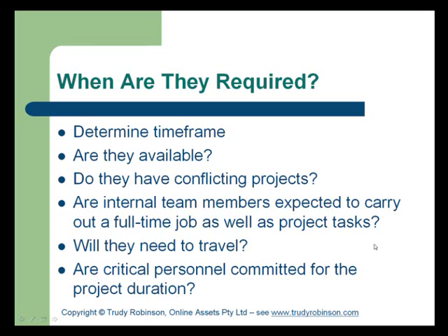Equally as important as identifying the tasks and the resources available is to ensure that the project time frame or timeline clearly indicates when those resources will be required, so that you are able to identify whether those resources will be available, which will have a big impact on whether you will be choosing them to be part of the project team. Equally as important is ensuring that those resources do not have conflicting projects, so that you have their total focus and priority. And if they are in a full-time job as well as being allocated to project tasks, it is important to ensure that their managers have total buy-in to the project and that you have good communication with those personnel.